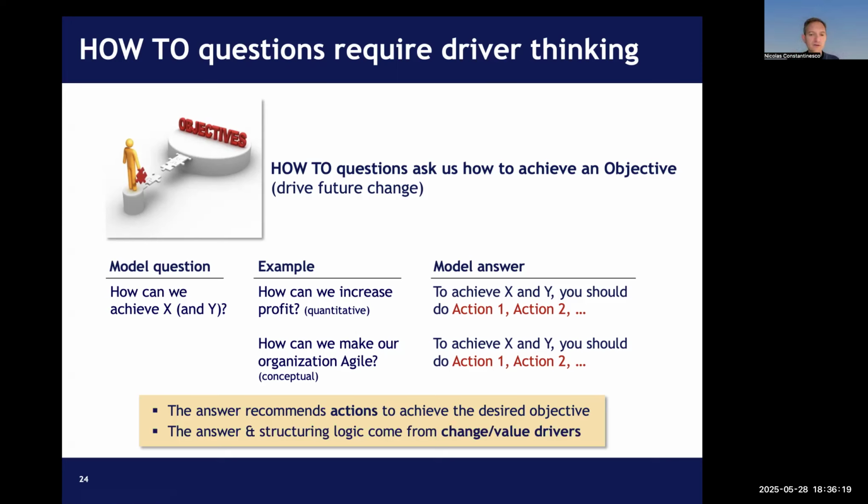Okay? So I'm going to show you how we can do this in a minute. Let me just first say this. By far, the simplest, easiest, most effective way of breaking down a how-to question is with more how-to questions. I really don't recommend trying anything different. And the thing is, how is the only preposition that connects directly with the notion of action. What doesn't, where doesn't, who doesn't, but how, yes.